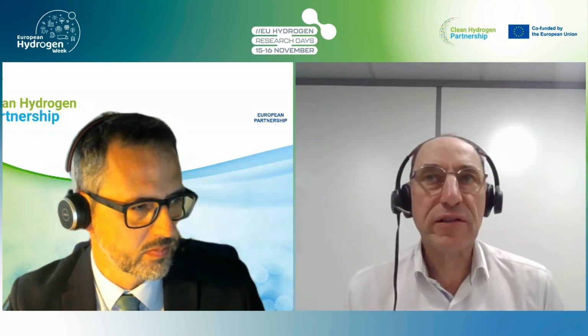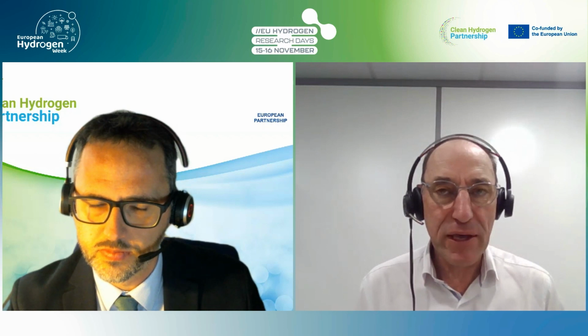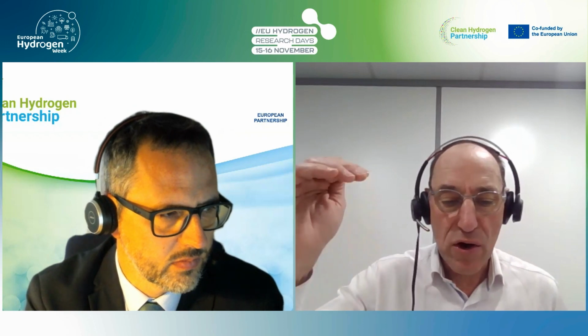So we have not started the certification process. It's not part of the SHAPED project. We are working for the time being on separate tests, meaning burst test, cycling test. We did the cycling test at vessel level, and burst tests have been done also at vessel level and were okay. So burst and cycling are okay, but we are now focusing on some other tests, which are permeation tests and fire tests. Drop will come at the beginning of 24 also, but we are not following the complete sequence, so hydraulic leg or pneumatic leg of the Air 134, but we are working step by step, in fact, checking individual tests one by one.